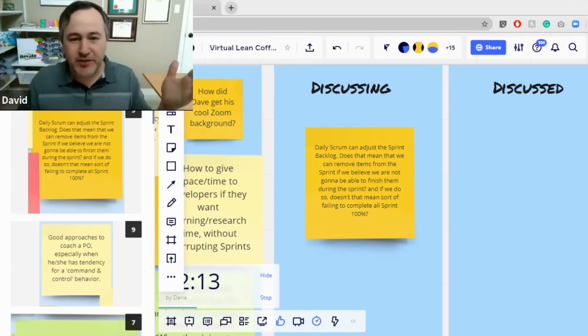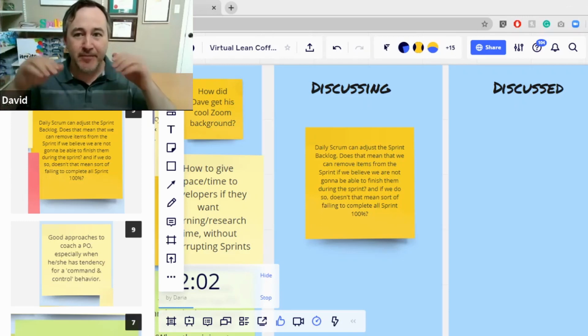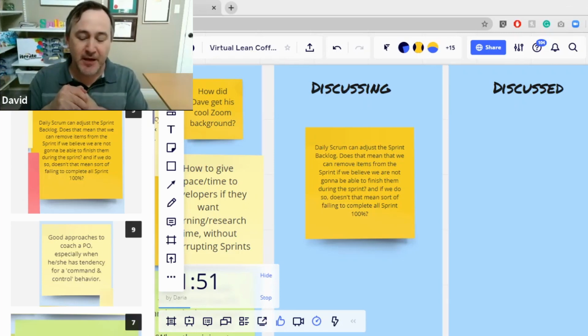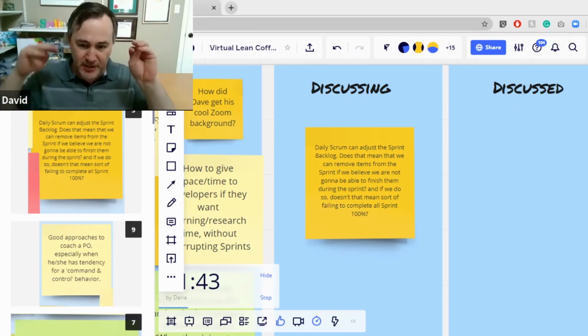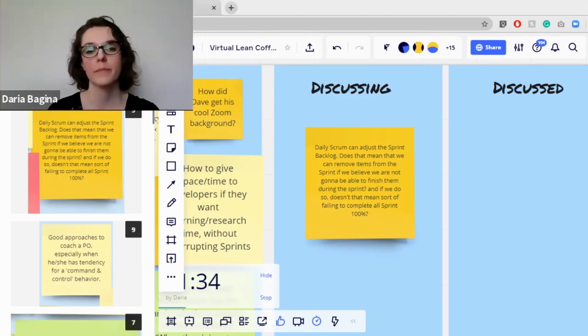And then midway through the sprint, during a daily scrum, perhaps it becomes obvious that, oh, all those things we thought we would want to do to improve the login experience aren't going to be possible. How can we scale back but still improve the login experience? How can we make tangible and concrete improvements to the login experience within the sprint? And so I think what I'm trying to explain is there's a difference between achieving a sprint goal and the granular pieces of that, because those granular pieces are probably negotiable, changeable.